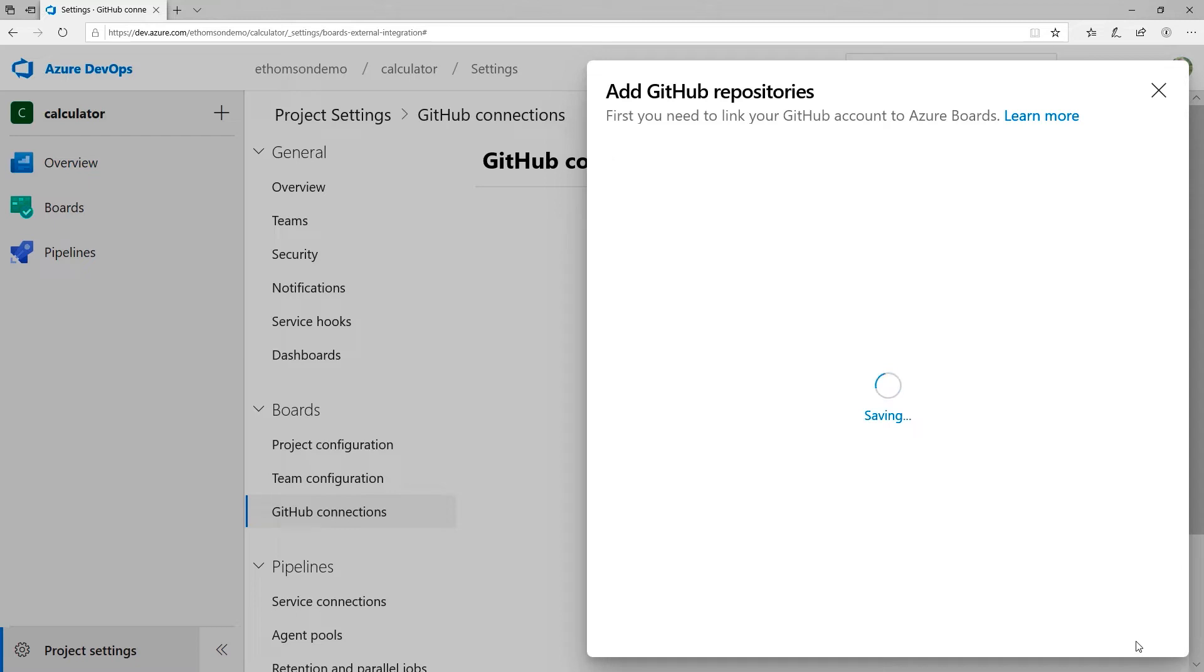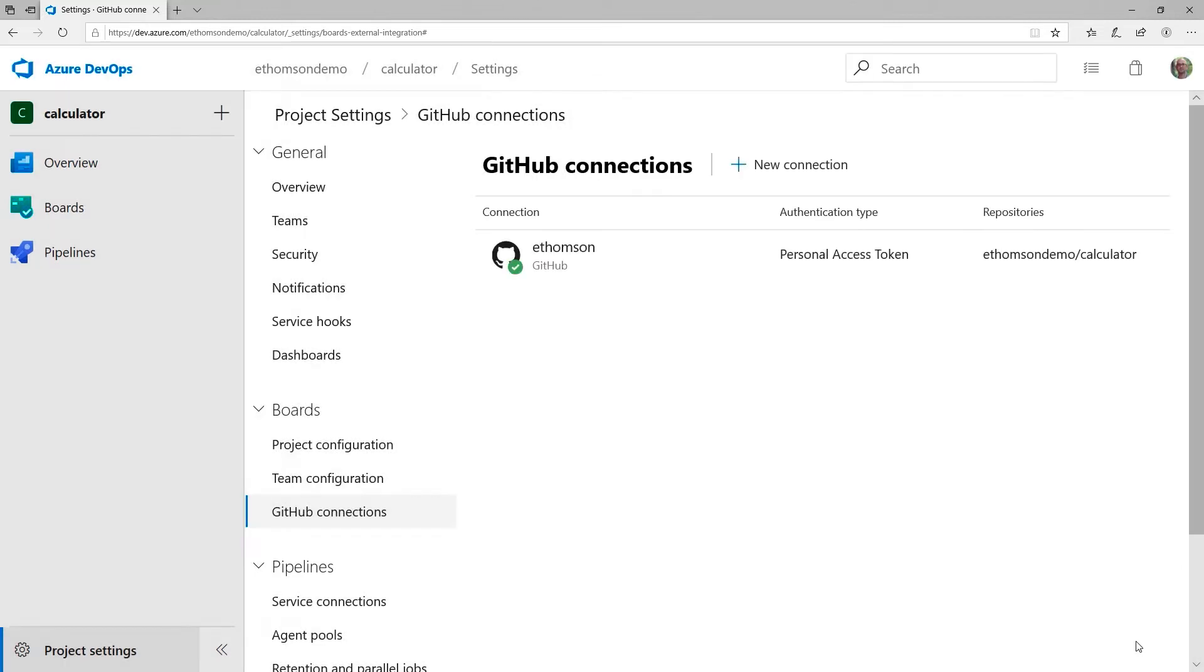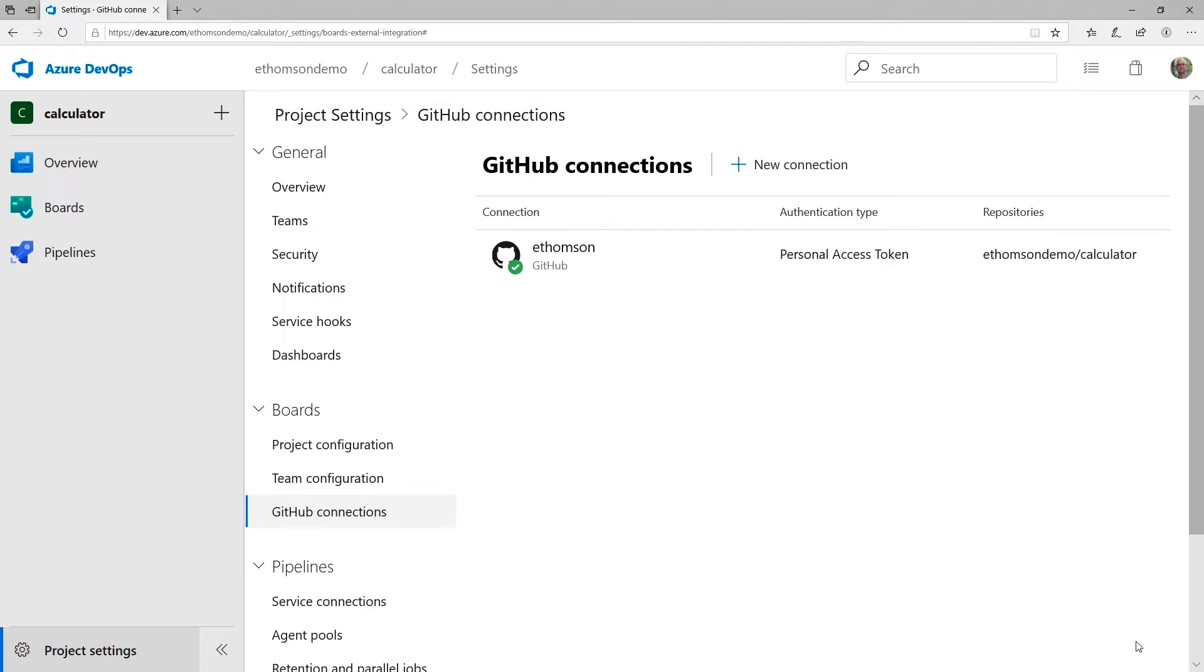And what that does is it will set up webhooks in GitHub that go to Azure Boards. So every time I create a pull request or comment on a pull request, Azure Boards will be notified. And that's what allows the linking between that pull request and a work item to occur. So once that's set up, I want to actually get started working on a work item. And I'll go through the process creating a pull request and linking it to that work item.